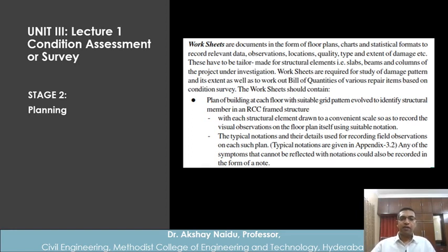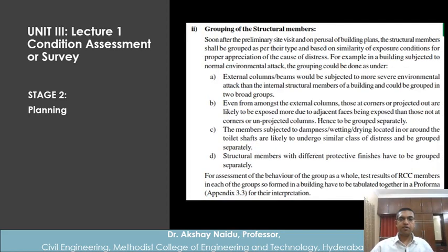So plan of building at each floor with suitable grid pattern evolved to identify structural members in an RCC frame structure. So we will see in a few slides to come a plan. In a grid pattern, it is very important to know the plan in a scaled drawing so that we can identify where to address what.